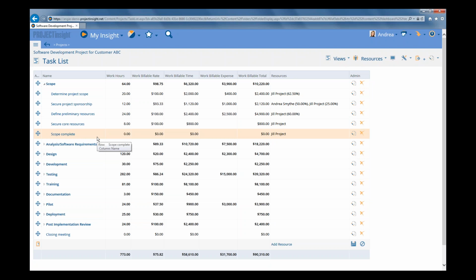So if that's the case, then you do want to record the agreed-to billable amount in separate fields than what you're seeing here, because it is possible that your project may change over time as things happen on the project, because as we all know, things always happen on projects. So you do want to make sure that you record what you're agreeing to bill the client. You could just agree on a total amount with no incremental billings, but in most cases you do have some incremental billings.